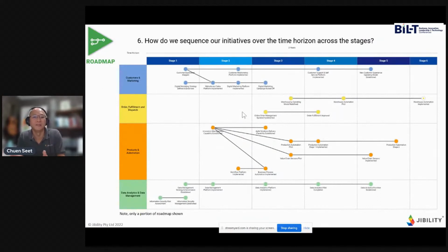like this. And I say it might look like this because clearly there are lots of different ways of visualizing a roadmap. This is just how we prefer to visualize a roadmap. And in essence, what this style roadmap is showing me is an initiative is just represented as a dot, and that dot is analogous to a milestone on a Gantt chart, and it's simply showing me when I need that initiative delivered by. It's not showing me when it starts. It's not showing me how long it's going to take, because at this sort of high level of planning, there's no way I know how long it's going to take to deliver this initiative. All I need to know is when I need it by.